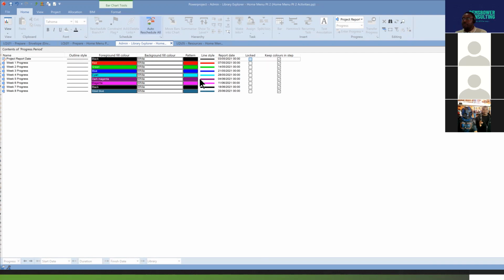Now let's look at the very first progress, which is week 1 there, the 7th of May. The next one is week 2, the 14th of May. That's 1 week apart. Week 3, the 21st of May. So basically, I'm doing a weekly progress report. If it is 2 weekly, you need to allow 2 weeks apart on your drop lines.